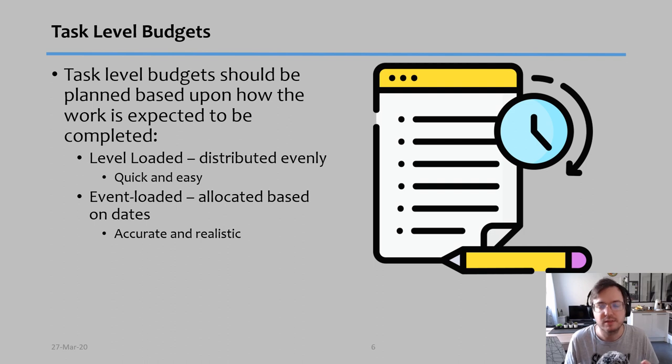So if you have a task, for example, let's imagine I start a task on the last week of January and it goes up to the third week of February. That means 1 week in January and 3 weeks of work in February. There are two ways to divide the total cost. For example, let's imagine the total cost is $4,000, so $1,000 per week, roughly.